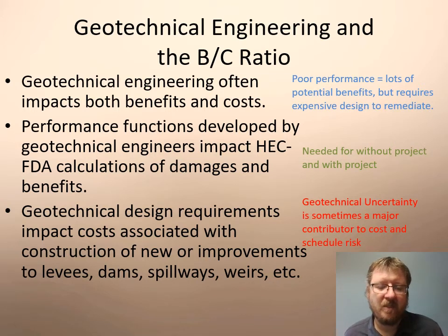Sometimes the geotechnical performance is very difficult to predict, and the uncertainty of the geotechnical performance or the geotechnical conditions at a site may be a significant contributor to project implementation costs. And so we need to understand how the geotechnical assumptions relate to the project estimated costs and schedule risks, and either investigate them or design for those uncertainties or plan accordingly through risk registers and cost contingencies.